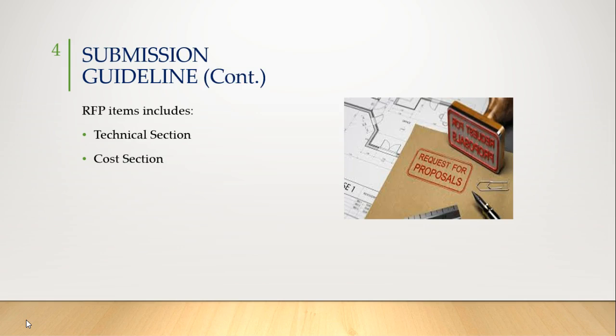The technical section. 2 months prior to the start day of the project, the supplier shall attend a kickoff meeting with the MPS and the Translation Department Services key team members to discuss details regarding the tasks outlined in the proposal, study design review, schedule milestone, supplier services, and other issues related to the contract. This meeting shall be via telephone, conference call, or in person and occur no later than 1 week after the contract award. The supplier shall work with the MPS and Translation Department Services key team members to develop an agenda for the meeting, which shall be finalized at least 5 days in advance of the meeting.